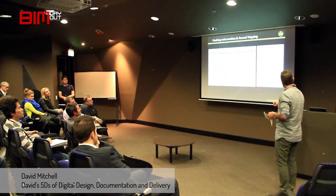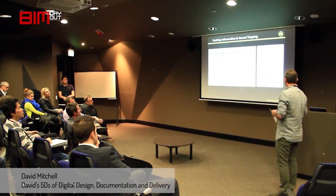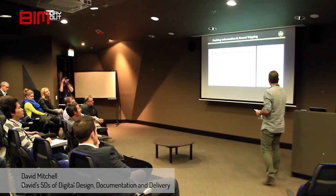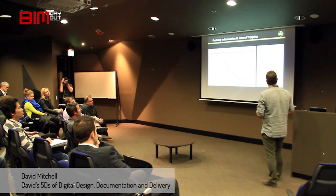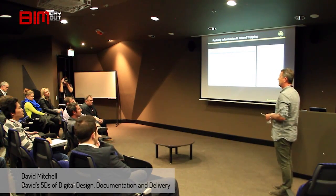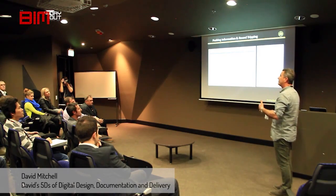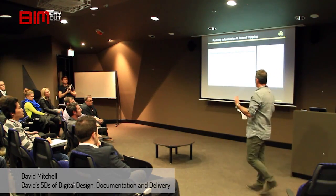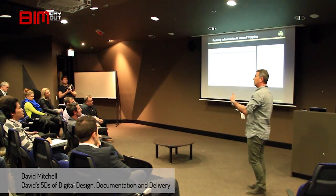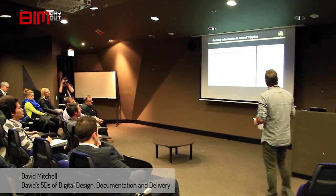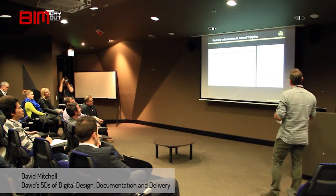The types of things that are valuable are trade package codes, work breakdown structures, activity codes, and costing codes for that project. Trade package codes themselves are extremely valuable, though they're difficult to put in at an early stage. What's important about putting information within a model is to put it there at the right time — if you put it there too early, you've got to maintain it and it becomes a nightmare.